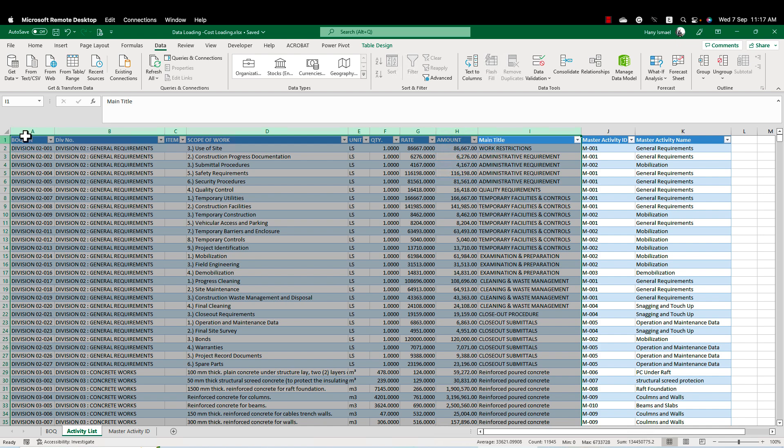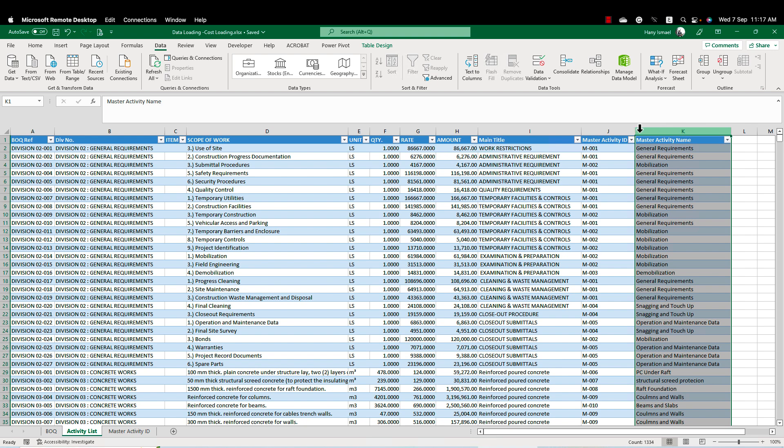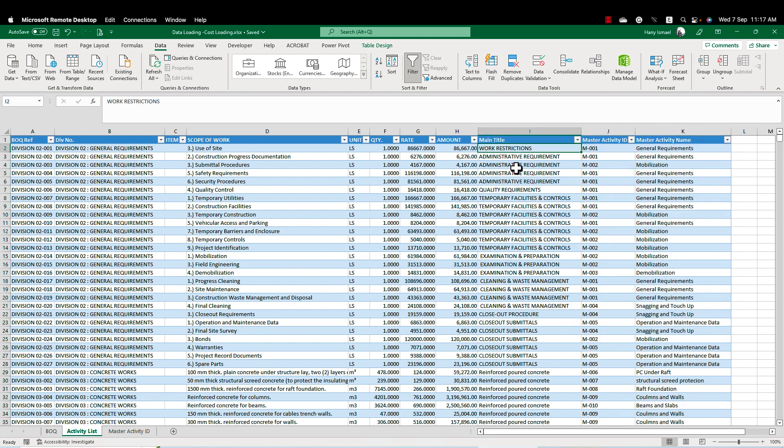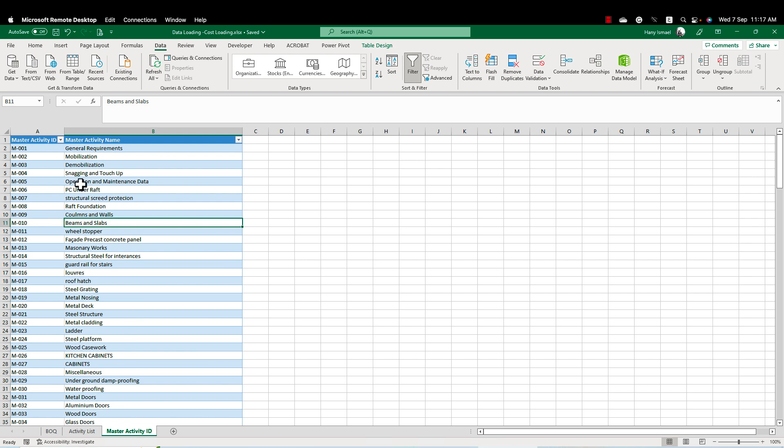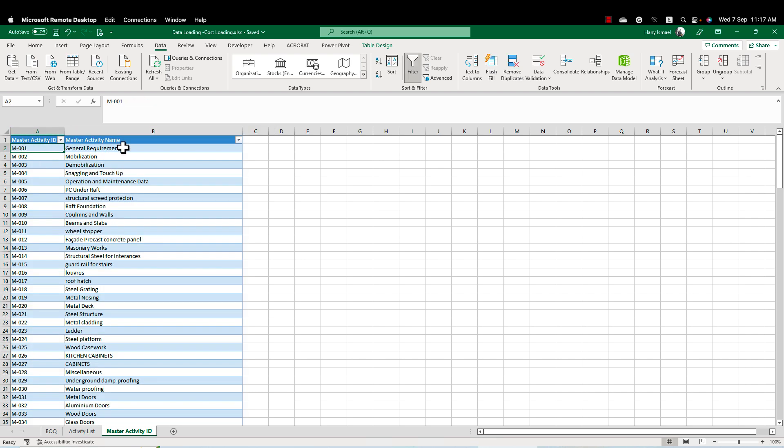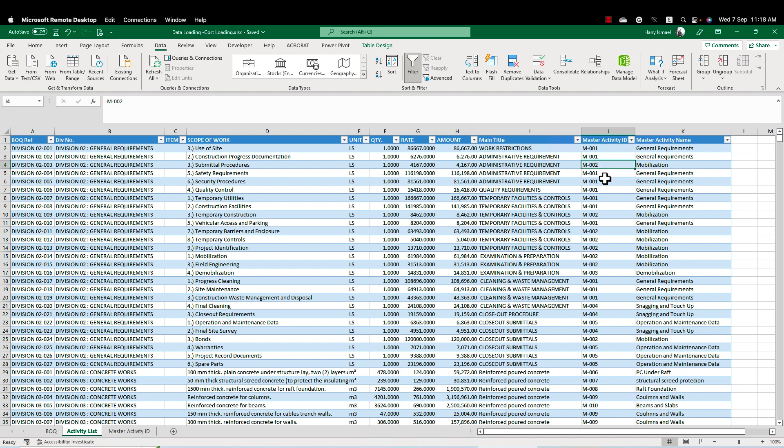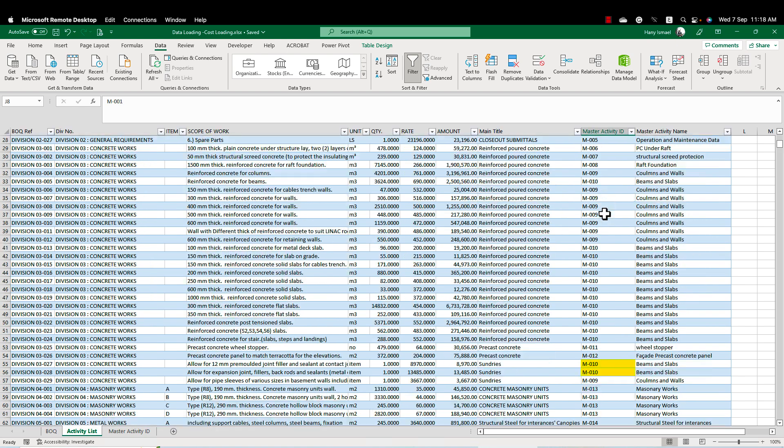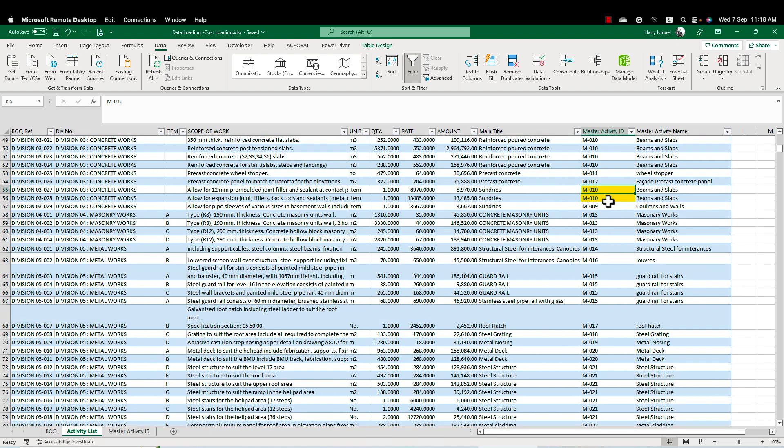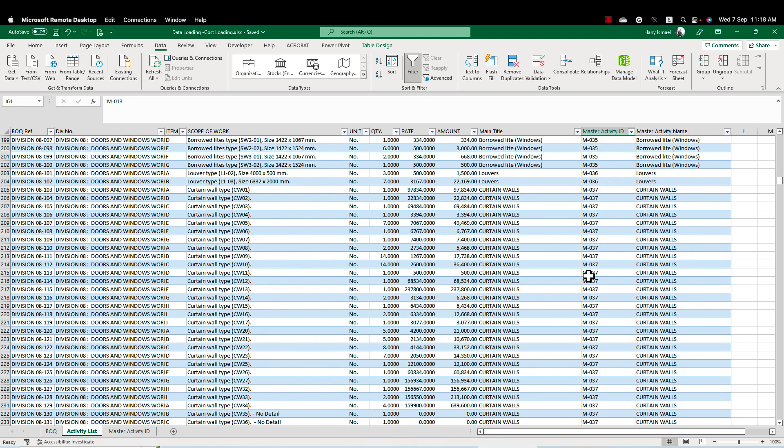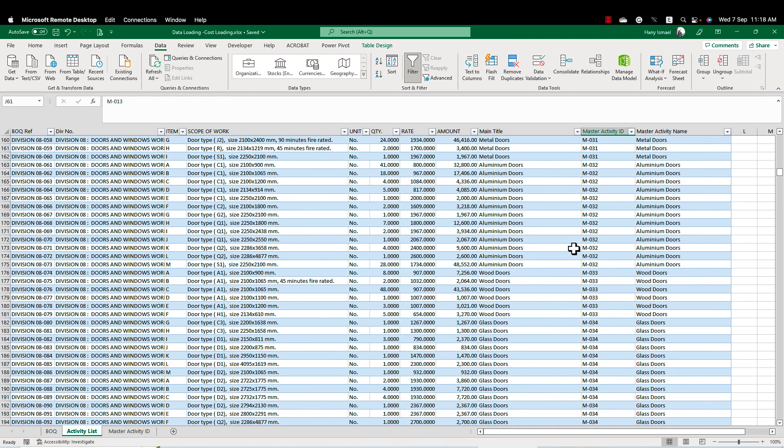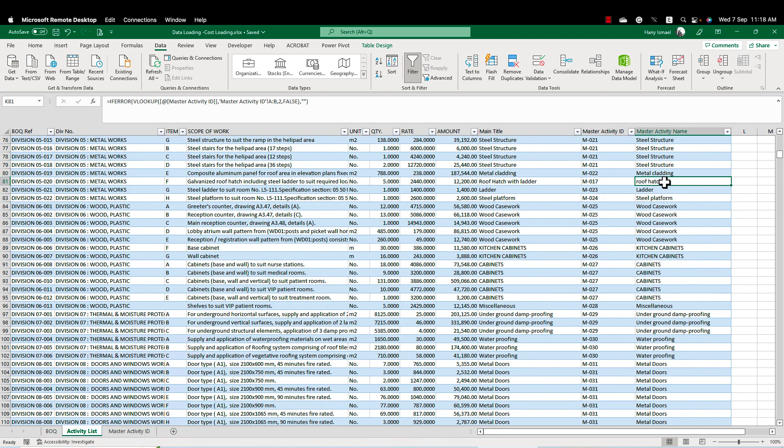So I start creating here the activity list. I have master activity ID and master activity name. So I'm going one by one in the BOQ item. Whenever I find a BOQ item, I put for it here in my master activity ID and the activity name. So I filled all the BOQ with the relevant items and I am now finished all of this.